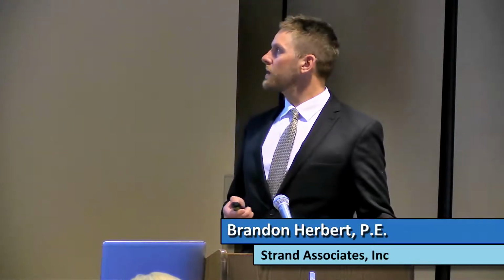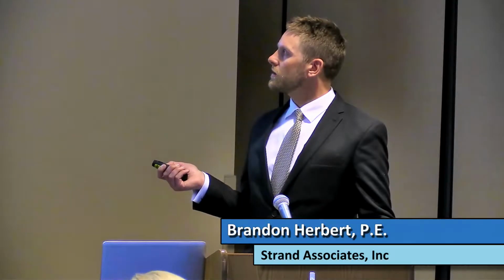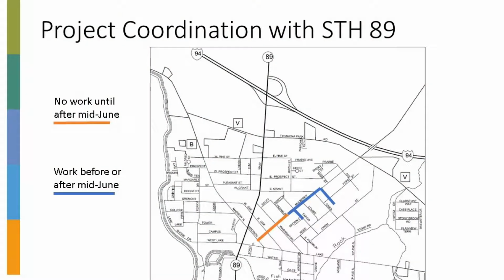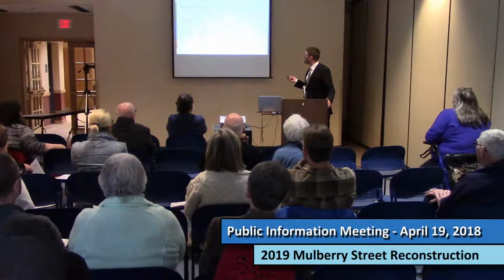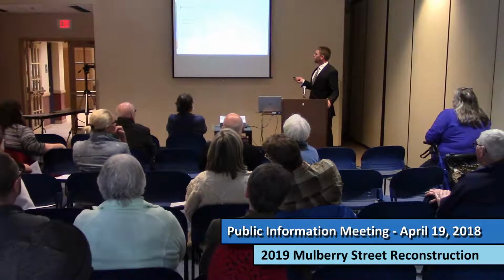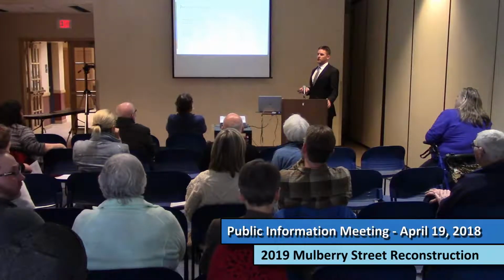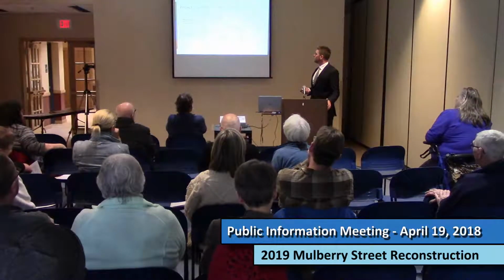For project coordination with State Highway 89, it's probably a popular topic now, we're going to phase this project, and this is something pretty new, I guess. The southern half of the project will not start until around mid-June. We're still working out the details about what exact date that will be, but it'll be midsummer sometime, that no work will be happening down here. That would be from Madison to, what is it? Just south of Franklin, yep, thank you. From Madison to in between Franklin and Fargo. And then the rest of the project to the north, they'll probably start there, and then the work could continue throughout the summer there, depending on where the contractor wants to work at.